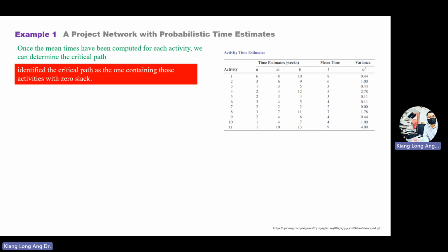So there are 4 ways of finding the critical path, as before we start the class. First, you draw the network, and then you calculate how the water flows through the arrows. How many pathways you have: pathway 1, pathway 2, pathway 3, then you calculate the time and find the longest. That is number 1.